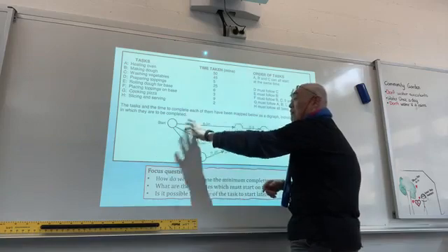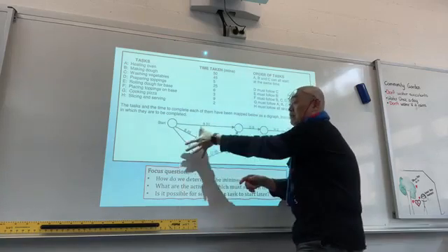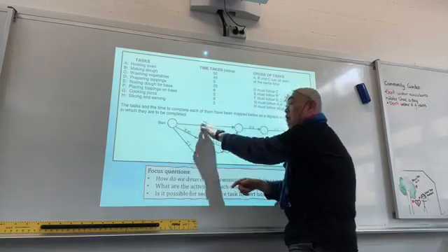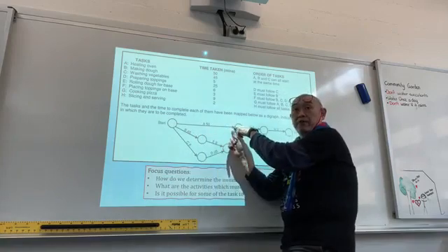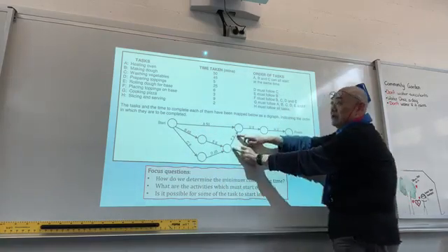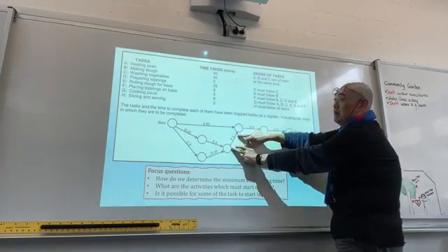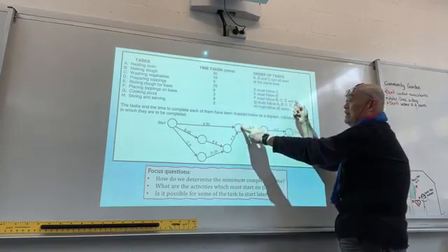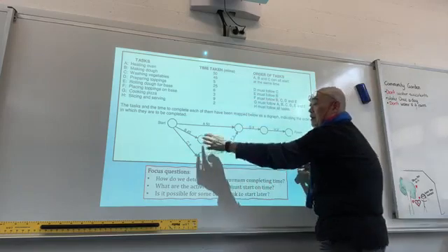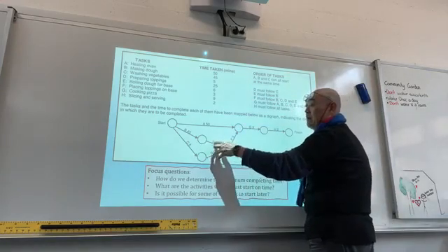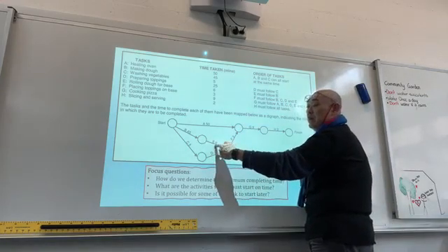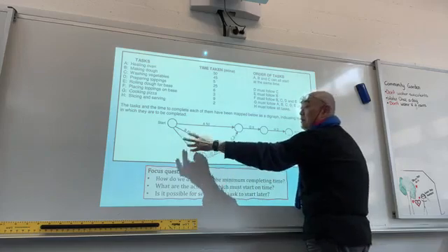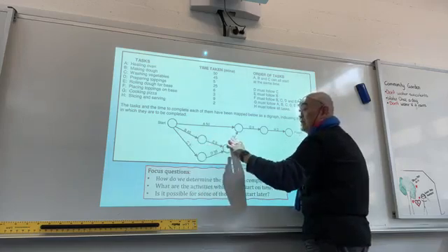And heating oven is another parallel path to that, because you need to heat the oven before you can put all this in. Then you place the topping on top, and F must follow B, C, D, and E. So if E and D do not happen, F cannot happen. So those are the predecessors of F.